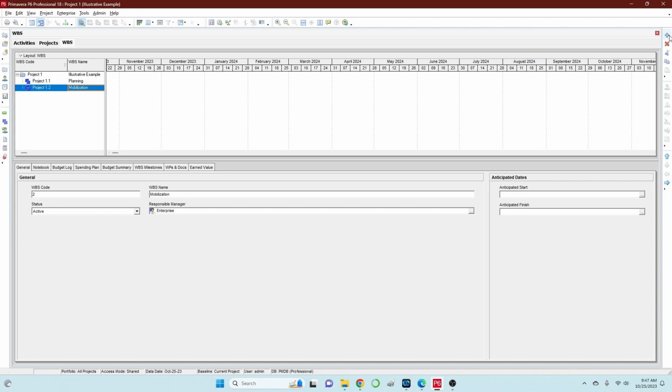If you're going to add an additional WBS, click add again, say for example, excavation and earthworks. Again, it went down to level 2, so make sure that you outdent that by moving it to the left side. And then probably add one more, concreting. And then just outdent that as well.